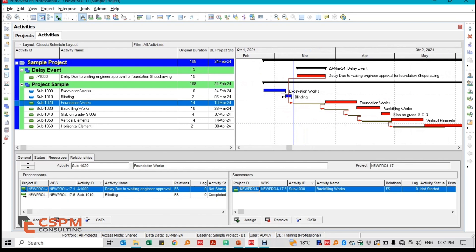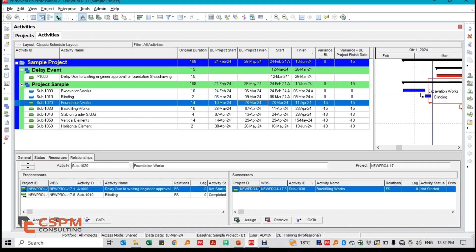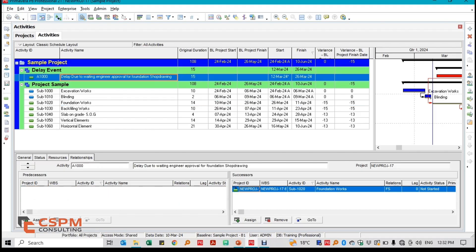Without applying Time Impact Analysis, this critical shift might have been overlooked or captured less precisely. Now, if we were using the Impacted As Planned method instead, we would insert the delay into the original baseline schedule, which wouldn't fully capture the nuances of the updated timeline or take into consideration the actual progress that happened. This is why Time Impact Analysis is preferred for projects with frequent updates.